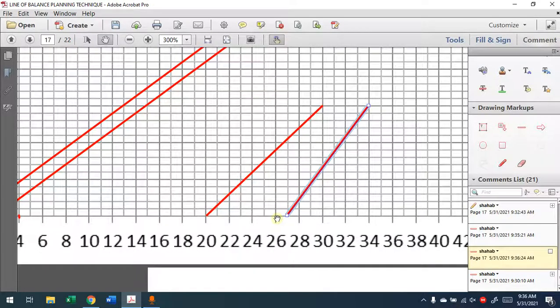So if I repeat this in the simplest manner, providing buffer time has two methods: you provide from the bottom or you provide from the top. You can try to provide from the bottom, and at the top, if it's less than the minimum buffer time, you know that it's wrong, then you can provide from the top and it will draw back down. So with trial you can do it, or you compare the natural rate of the activities. If the activity you're going to draw has a lower natural rate than the one that it depends on, you can start from the bottom. If the natural rate is higher than the one that it depends on, you start from the top. So just keep it in mind.